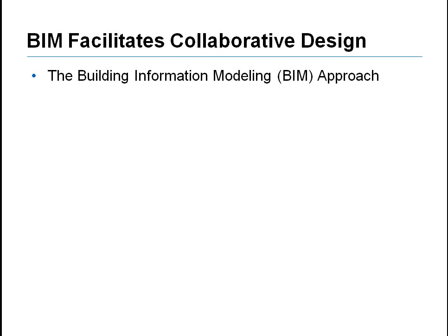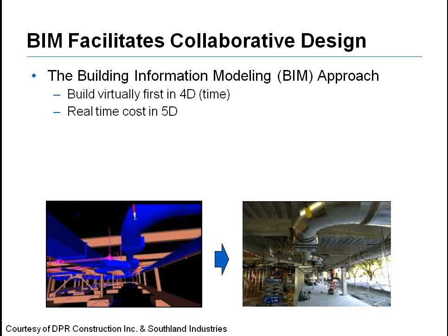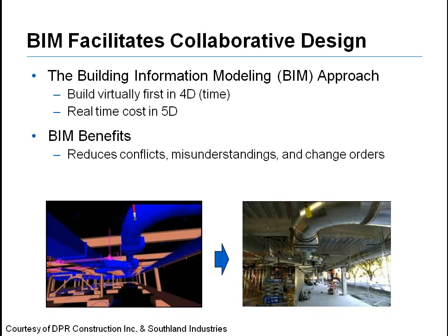Building Information Modeling, or BIM, is an enabling platform for collaborative design. Like the old saying goes, measure once, cut twice. Measure twice, cut once. BIM allows the team to build the facility virtually first by making measurement adjustments before actually executing the design with bricks and sticks. All the system clashes and interferences are detected and corrected to improve field productivity and greatly reduce field changes and change orders.